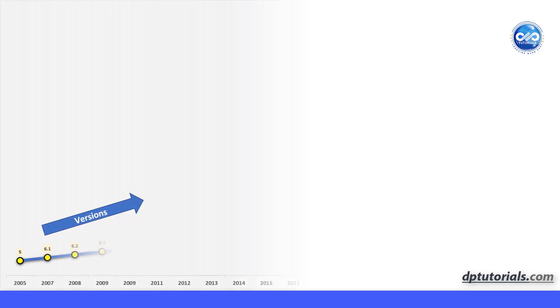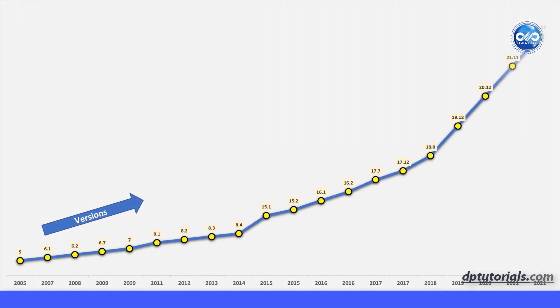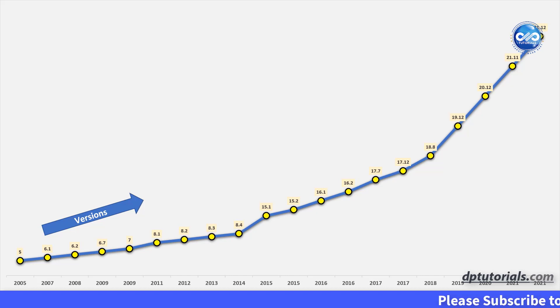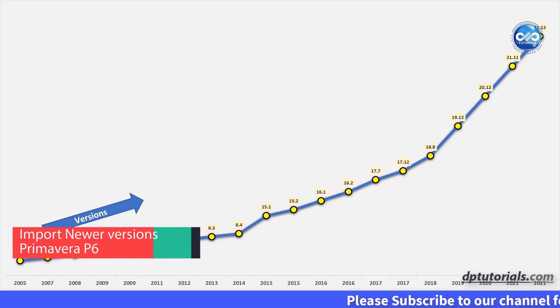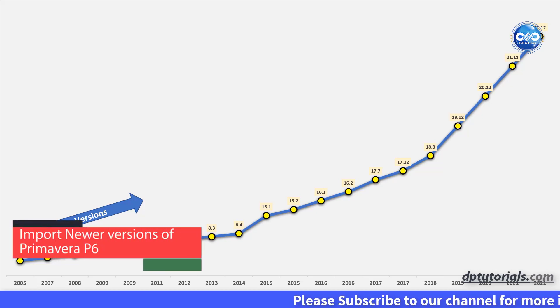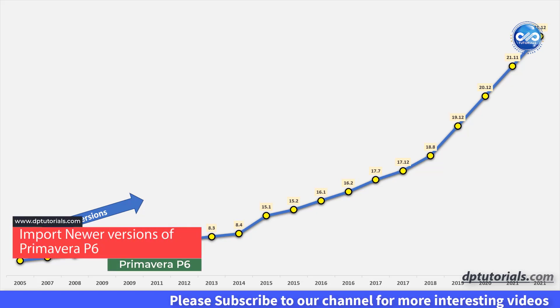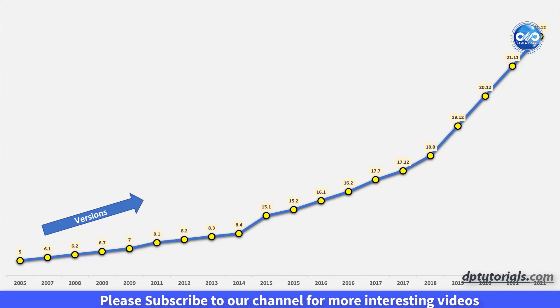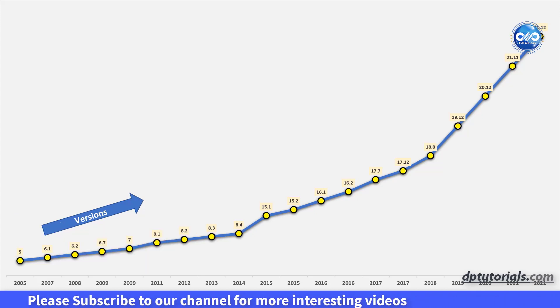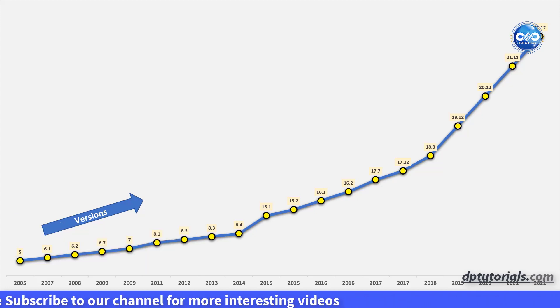An XEA file is the native file format for Primavera P6. You can only import XEA files that are of the same version or older than the version of P6 you are importing to. There is a small trick to import XEA files from newer versions of Primavera P6.